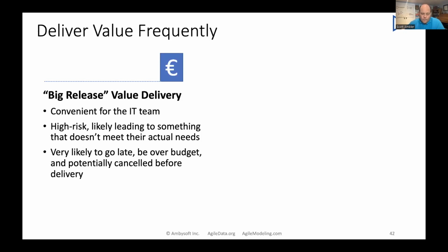Well, first of all, we need to be delivering frequently. One of the challenges with these big bang, let's take 6 months or a year or so to get something out the door, is that they're phenomenally risky, and they have a huge failure rate. The traditional data warehousing projects, the first release almost always tends to be a failure, like the 80, 85, 90% failure rate.